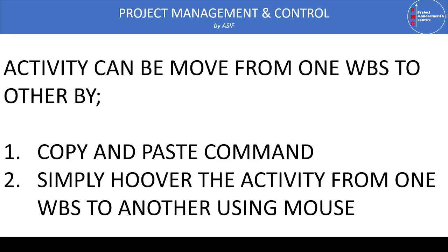There is another surprising command: you can use the mouse button to move an activity from one location to another. Click on the activity, hold the mouse button without releasing it, and move toward the WBS organization bar with vertical bars. When you reach those vertical bars, a small white rectangle will appear under the arrow sign. Once that white rectangle appears, you can navigate to the required WBS and release the mouse button to move the activity. Let's demonstrate this in Primavera itself.